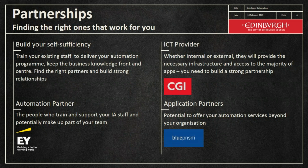And then they said the prices were going to be going up in 2019. Well, the contract for their software is actually up in 2019. I think procurement are currently running a procurement exercise to find a new supplier. And that brings an interesting avenue into it: we're now baking this into our future contract requirements. So you make sure that your procurement and contract teams are aware that they're going to need to build that into their requirements.